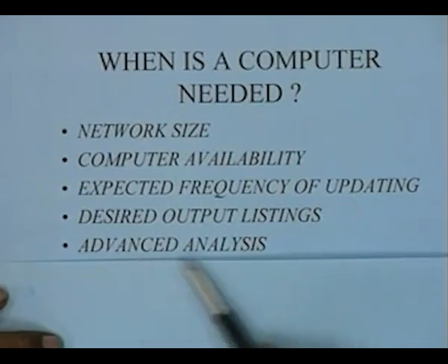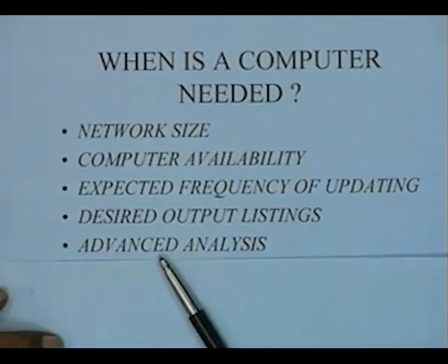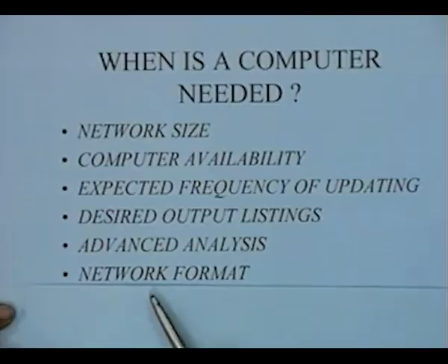You can have a computer which can probably do it for you, and of course depending upon the nature of the advanced analysis that you are looking for. By advanced analysis we mean features like time cost trade-offs, resource considerations in projects, cost control, and all these things. I mean anything other than basic scheduling. And of course the network format.